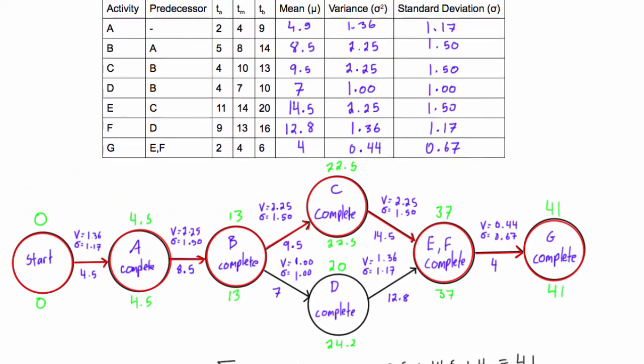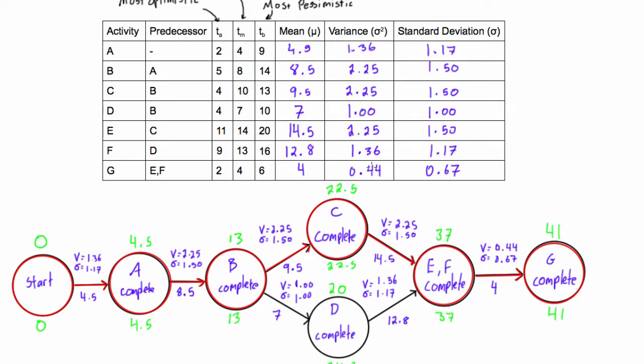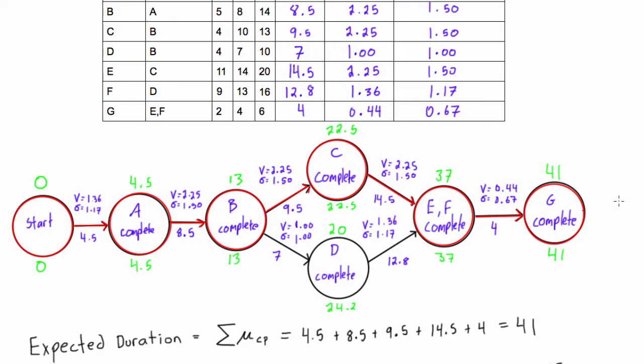So something to notice is don't just go and add up all of the variances for every activity in the project. It's every activity along the critical path. Same with the duration, and you know that from doing network diagrams up until this point.